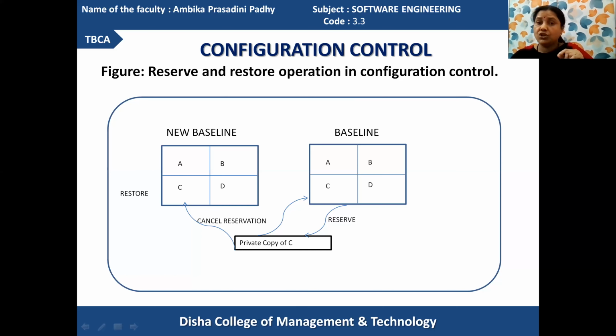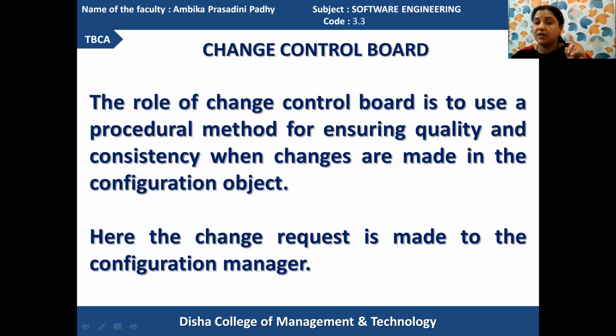The configuration control board is there, and that board will check the changes to be made on a particular module and whether the changes need to be updated or not. Got it? The change control board consists of either the project manager or the senior member of the project development team who has the knowledge regarding which type of controls can be applied, whether the control will be beneficial or not.